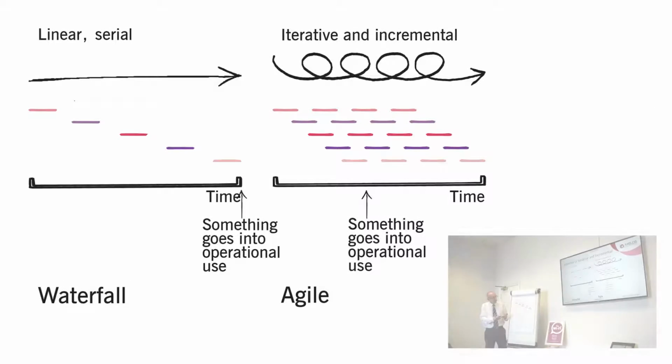But Agile looks at it differently, but not totally differently. So if you like, Agile is still using the waterfall, but they're actually like mini waterfalls. We don't try and do 2 months on analysis, 3 months on design, 4 months on build. We try and think, let's take something that we can deliver early and do a sort of mini waterfall. But not only that, a sort of idea of overlapping these waterfalls. So if you like, trying to create this iterative and incremental way of working. And this iterative and incremental is a fundamental concept in Agile. It's iterative, incremental, bit by bit by bit.